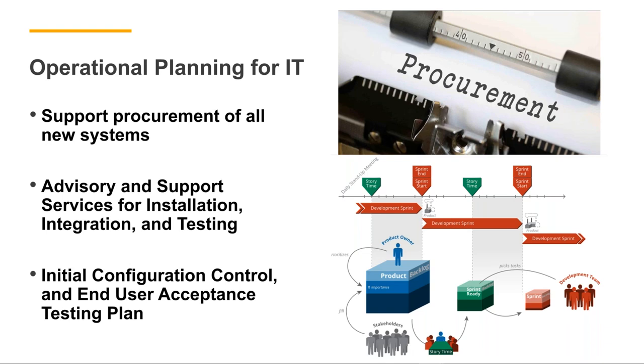And so that's one thing to keep into consideration is you're not just planning for, okay, once it's up and running, how do I install my software? If you're waiting until you have the keys to the facility to figure all of that out, unfortunately, you've waited too long. And like I said, you could result in up to probably a 2-year delay getting all of your systems online. And just for general awareness, you're talking about 40 to 60 systems on the high end just to operate for general operations of a biosafety level 3 facility. And so that's a lot to plan for. And you do need that lead time.